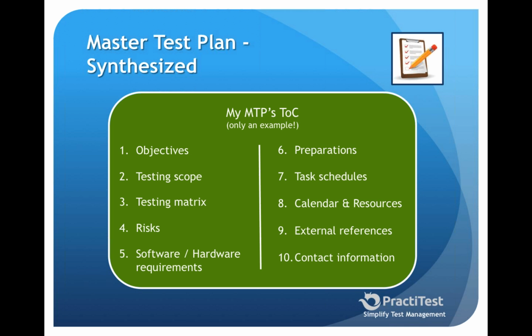So when you're actually doing the calendar and resources, if you don't want to have, again, too many tester licenses for this quarter or something like that, you can actually play within your calendar allocation. Try to see, okay, on these 3 weeks, we're going to have these guys working with tester licenses. Those 3 weeks are going to be other people working with tester licenses. That is on your calendar and resources.